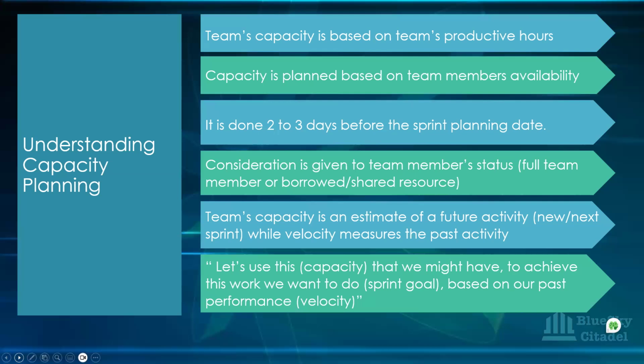Or it might be in the evening, or they might say he can only do 2 days a week with you guys because he's doing other things for us, or he's doing 3 days a week with your team and 2 on his team, depending. But there's always that consensus. They won't just give you their member like that. So it will be a borrowed resource. And once that is in place, when you are allocating work, you can't give the person coming in for 30% the same workload that you're giving somebody who is there 100%.